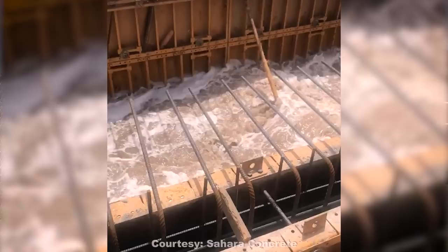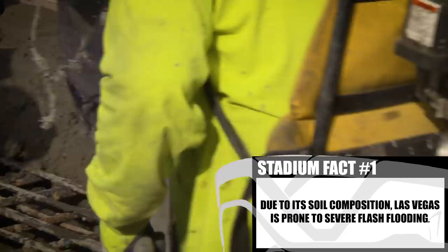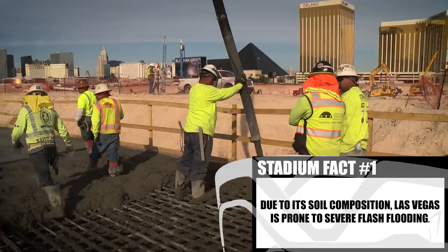We knew coming into this that the wet season was on us, and timing and phasing has been our biggest challenge. Danny and his crews work to move the box culvert out of the way. Continuing to finish the new tunnel frees a path for Mortensen McCarthy to begin the process of dirt removal.